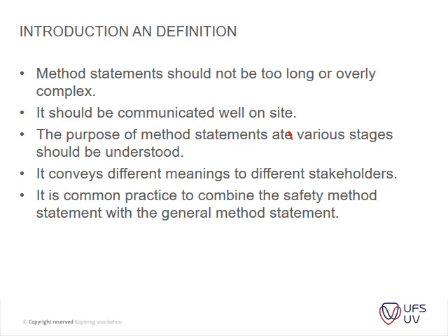For instance, with the examples that I've gone through for your pre-tender stage method statements, it doesn't help going into too much detail because you don't have the time and money to do so, and because you also don't have all the information yet. Maybe the client or the engineer will come back and say, but you have to use a concrete pump, or you can't use the concrete pump. You need to reverse your trucks in and go out again. So that's the stuff that you need to consider.